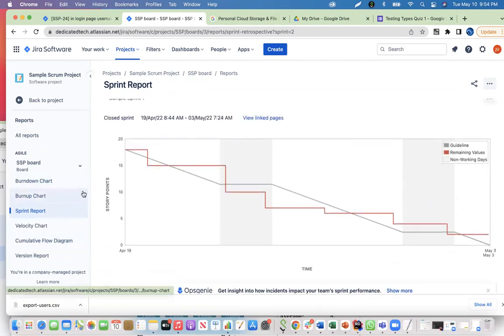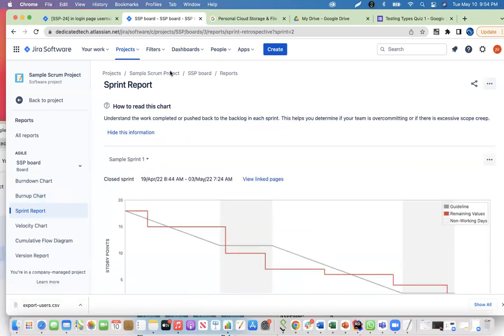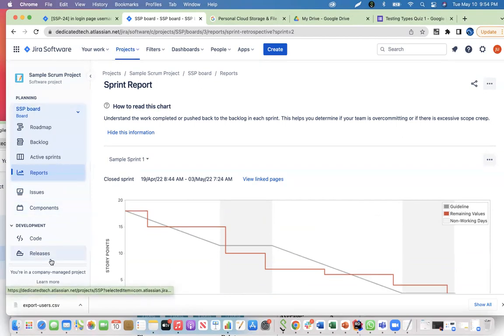So this is something that they will review at the end of the sprint in your sprint retrospective meeting. You can also bring up other issues in the sprint retrospective. If developers didn't give you enough time to test, you can bring it up and say, look, we had to rush at the last minute. QA shouldn't be rushed because we can make errors and let bugs go. So moving forward, we shouldn't do last minute items. All right, so that's pretty much it.